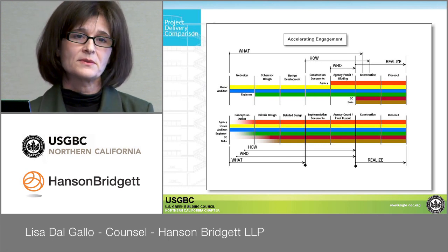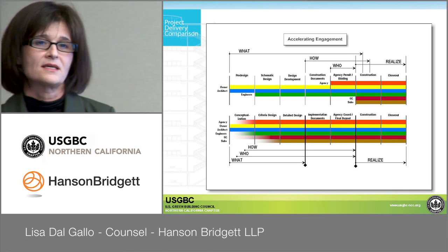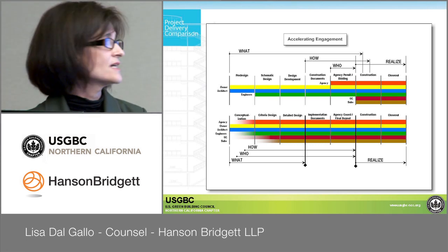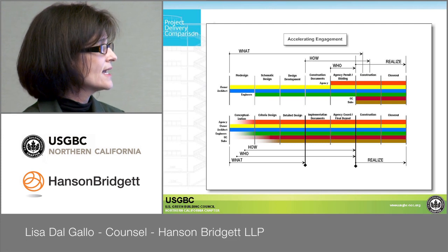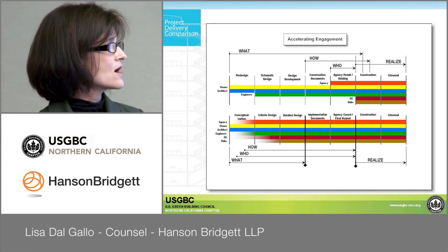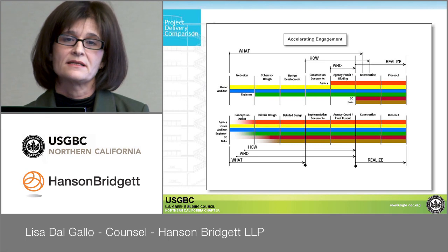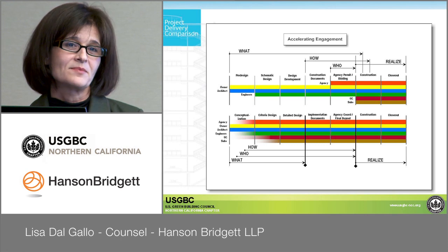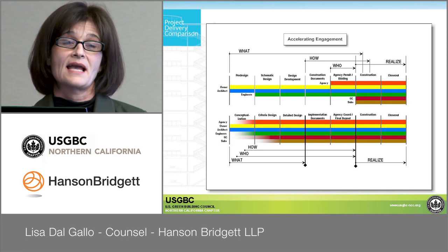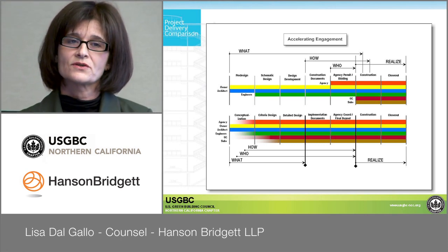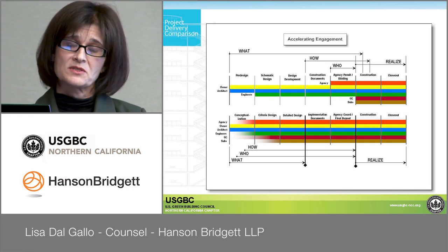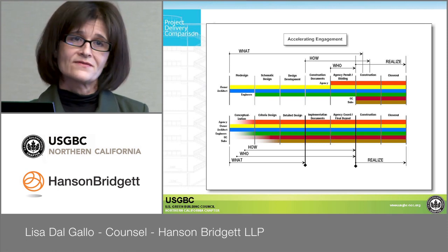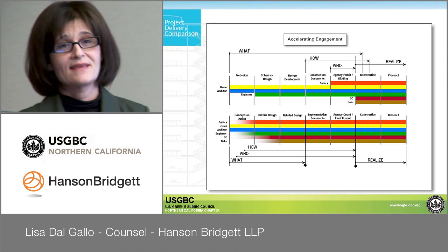And for sustainability purposes, this is really pretty key, because I think it's very difficult if you're going for any kind of certification to have key people coming on way over here between the construction documents and the agency and permitting if you're trying to achieve any kind of LEED certification. Now, your architect might be a LEED accredited professional and may have an idea of how to achieve that goal, but until your contractor and those key people, especially MEP with regards to the energy and atmosphere credits, come on board, and if they come on board early, you bet they know how to do it.